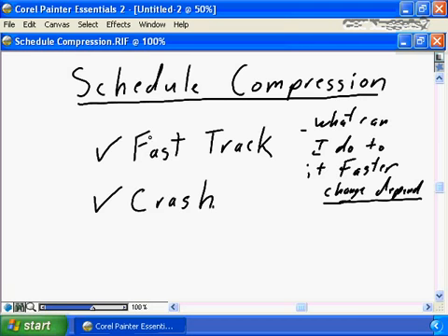Another thing you can look to do to fast track, can you add resources? If you add extra resources to your project and reassign some tasks to the new resources, does that improve the project delivery end date? If you add resources and start to add resources to specific tasks, so instead of having resource number 1 working exclusively on a task, maybe you can add a peer, a buddy to that task, and complete the task faster.